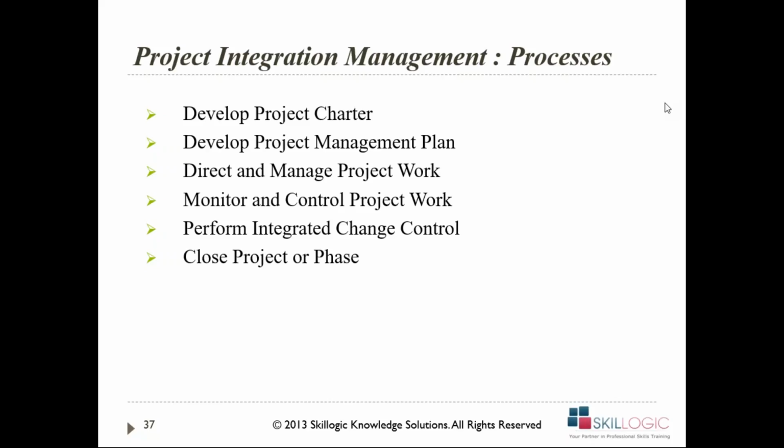The change control board rather. You submit it to change control board, who can take a decision and can either approve it, or they might reject it, or they might defer it for the future. In any situation, it gets recorded into the change log, so that all the changes are recorded into a log, so that in the future the same change is not analyzed again and again. It's already analyzed. Whatever decision has been taken, it's parked somewhere, right? So that we can refer to it and we don't keep on wasting energy. If the change gets approved, we need to implement it and then monitor the success of the change and report it back. Right, so this is the change management process, and eventually we close the project.